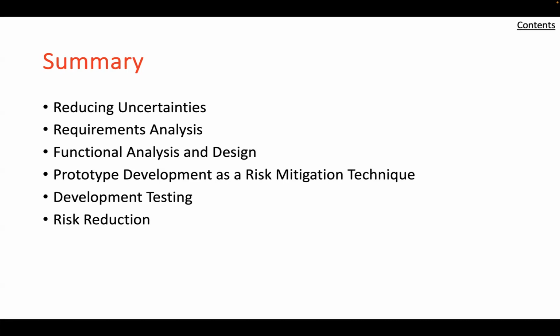Then we had prototype development as a risk mitigation technique. Prototyping may be used for a variety of reasons. Some may be to reduce risk to the program, to explore technology limits, or inform the customer on cost and technical maturity. Program risks requiring development may result from a number of conditions: unusually high performance requirements, new materials and processes, extreme environmental conditions, complex component interfaces, and new software testing.